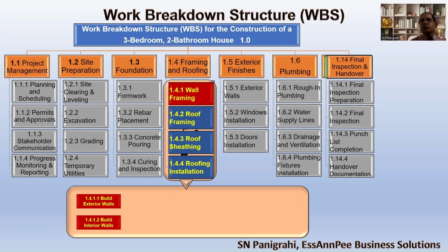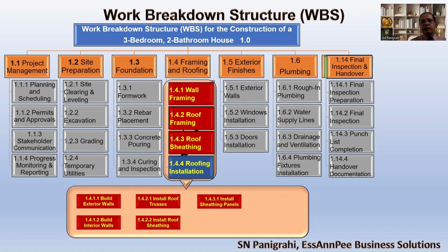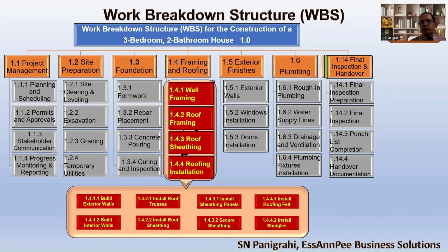This process we call decompose. Decompose is the technical word for breaking down high-level works or tasks into lower-level tasks. So each of the planning packages we are breaking down further into the work package levels. These are the different work packages. As I told you, at the top we have the project level, the high level. The first level of decomposition is generally a control account.